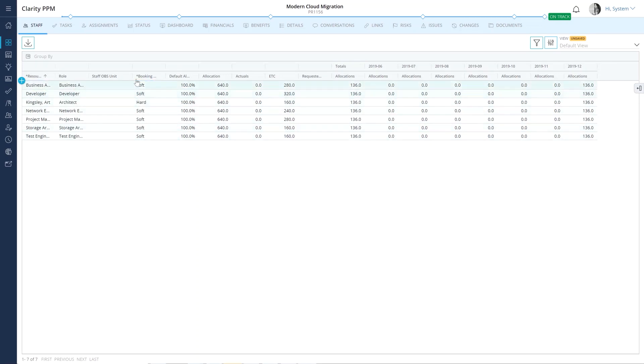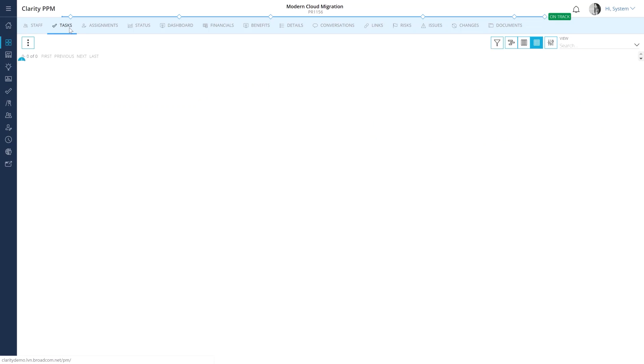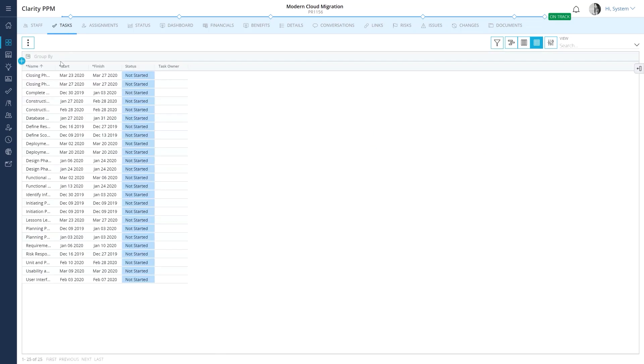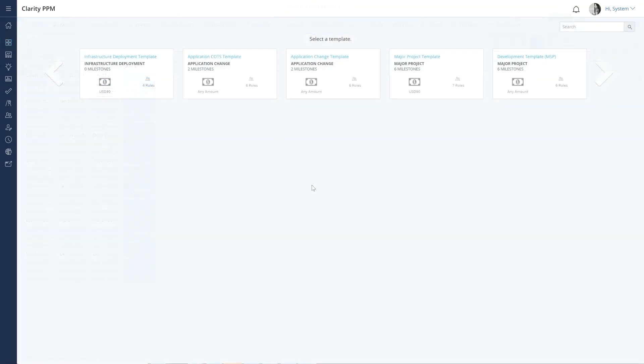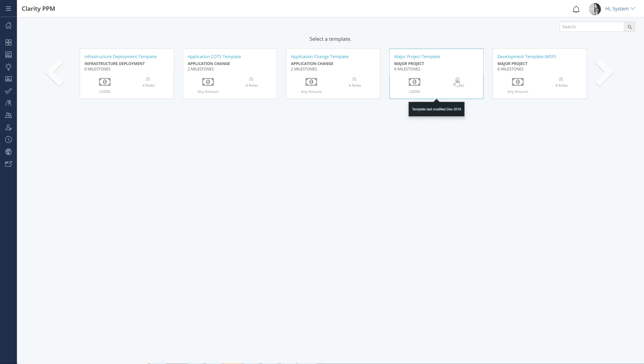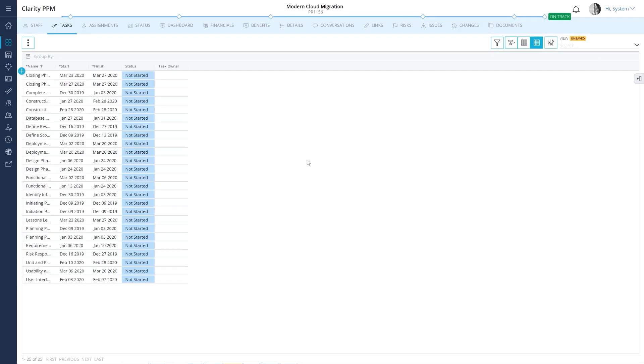Now that we have allocated a resource to the project, let's review the tasks assigned to these resources. The default tasks you see in the task module are based on the template you selected. These tasks were also assigned to various roles in the template. When you replace the role with a resource, the resource was automatically assigned to the relevant tasks.